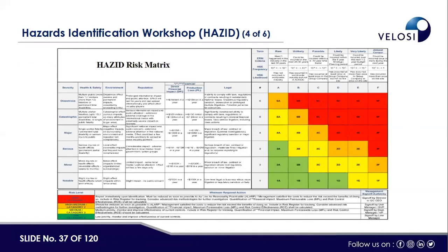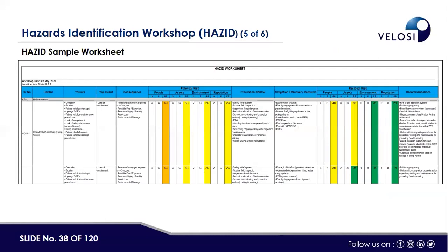The risk matrix we normally use starts with severity levels: notable, minor, serious, major, catastrophic, and disaster. The probability levels include: rare, unlikely, possible, likely, very likely, and almost certain. We assess both unmitigated and mitigated risk levels using this matrix. This is the sample worksheet used in the HAZID workshop. The first column identifies the hazard, followed by threats, top events, consequences, potential risk (unmitigated), and residual risk (after control measures).